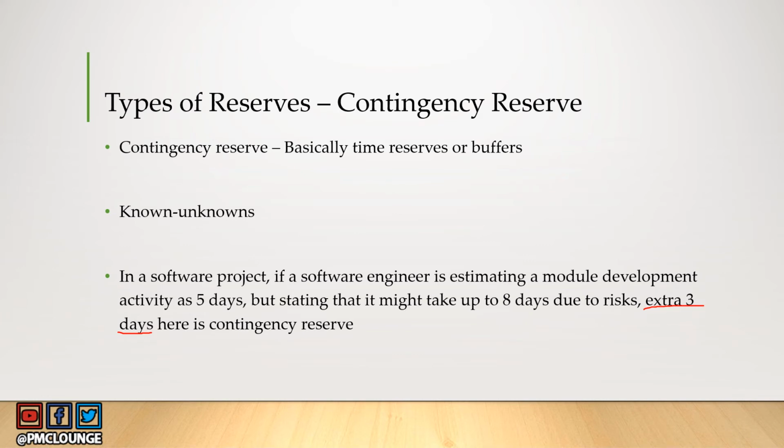Now, is this a good way of coming up with a schedule? Of course not, and that is the reason why you need to analyze the reserves. You need to do reserves analysis to make sure that not every single activity has reserves unnecessarily. So you need to know about certain risks before you add reserves.